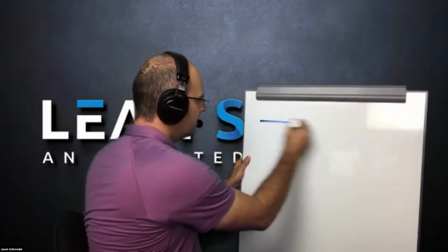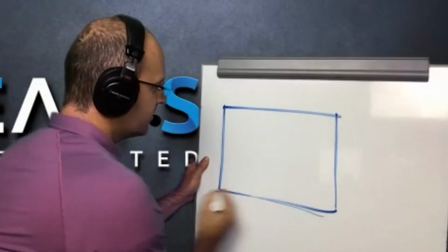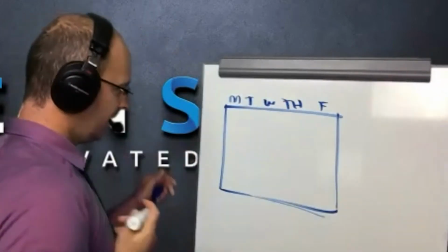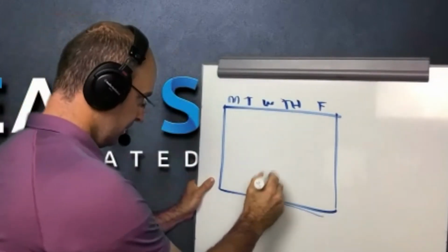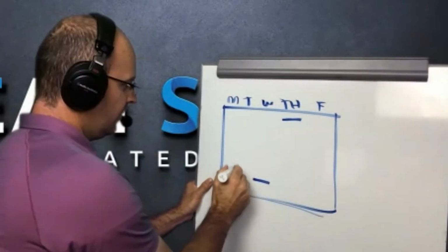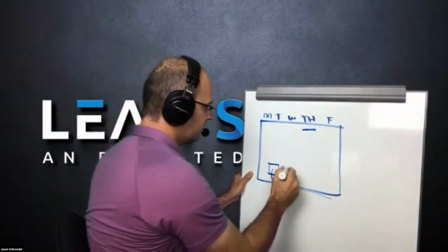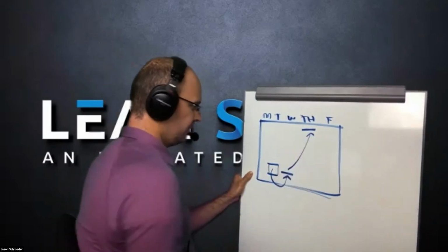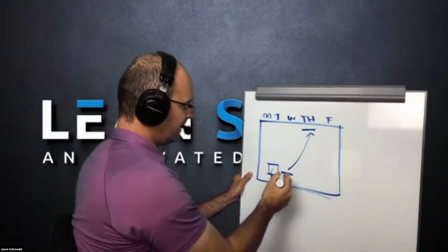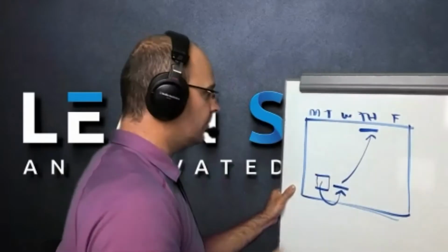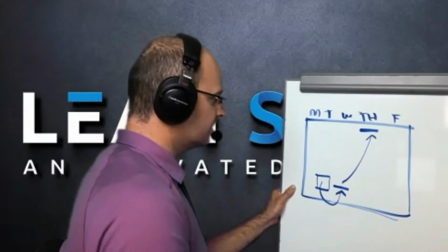In the weekly meeting calendar that we have talked about in previous meetings, Monday, Tuesday, Wednesday, Thursday, Friday, right? I advocate having an afternoon foreman huddle and a morning worker huddle. You have your trade partner weekly tactical, which then allows you to host the foreman huddles. And then in the foreman huddles, you communicate with the workers. By the time you've had a foreman huddle and talked to the workers and asked them, what's in your way? What's bothering you? What's wrong? What's giving you a hard time?